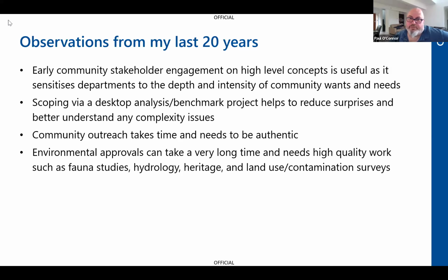The gasometer was demolished many years ago, but all the hydrocarbons from that gas plant seeped into the ground, which meant the ground basically needed to be drilled and irrigated, and all that contaminated water had to be brought out of there and burnt. So that was extremely expensive. I think 60 million just to remediate the site. But there's no other option because you can't put public housing or schools on there if you haven't removed those toxins.